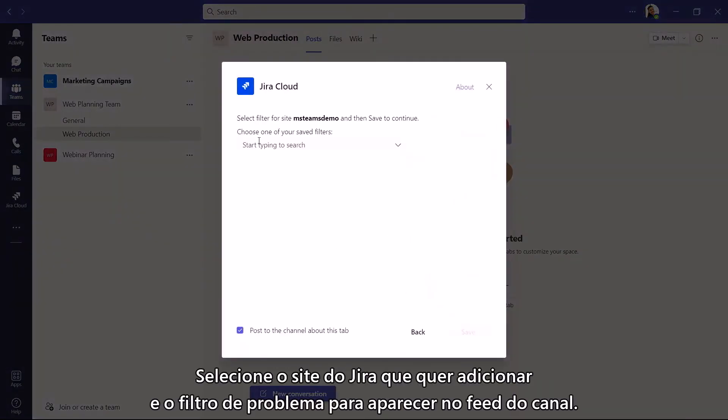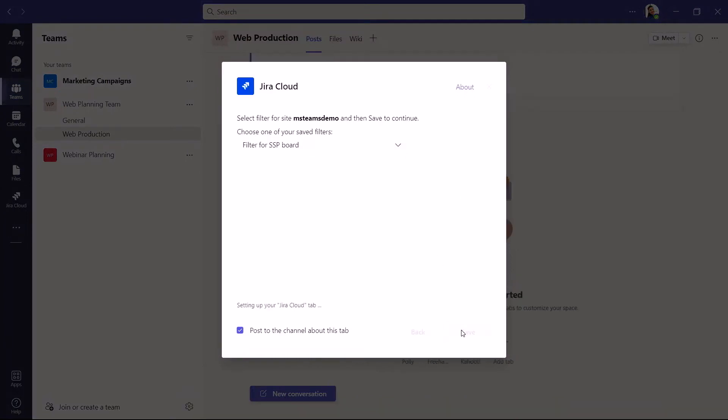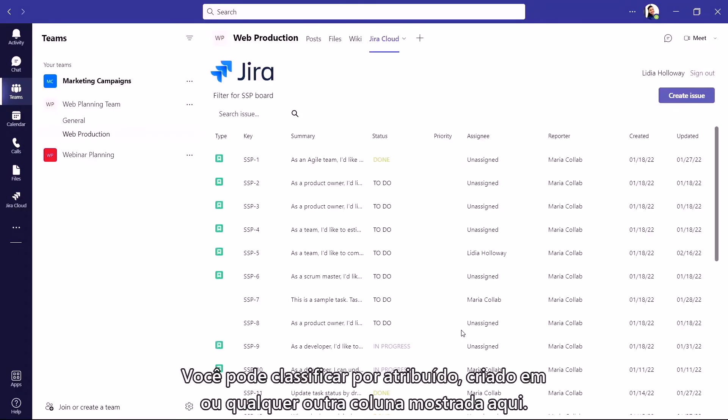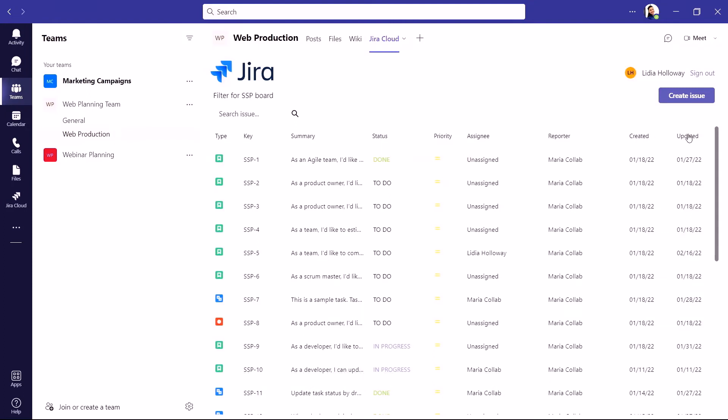Select the Jira site you want to add, and issue filter to show up in your channel feed. You can sort by assignee, created on date, or any other columns shown here.